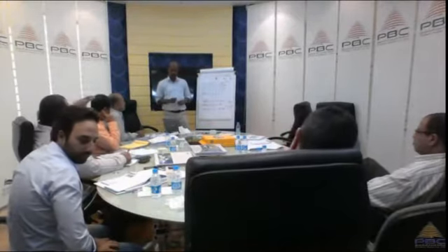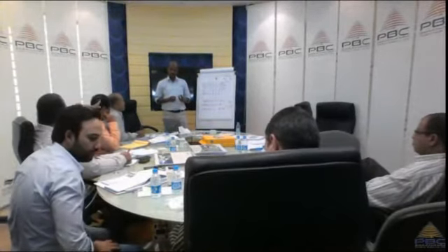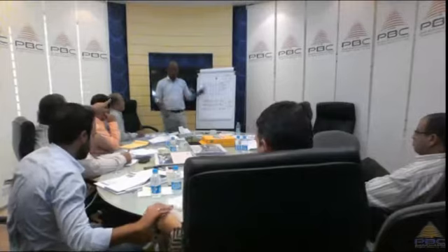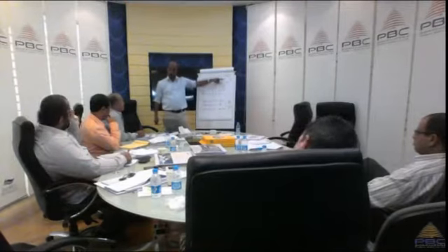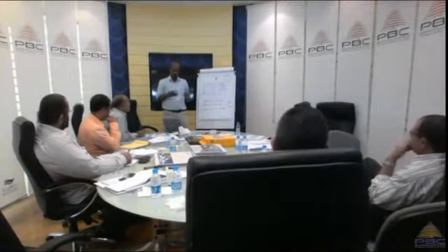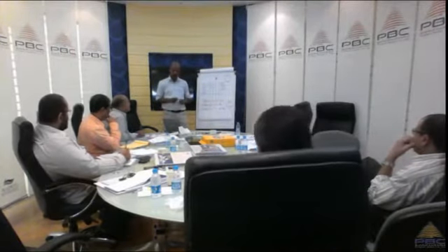If we change your cost of a day, we have to work out the mathematics. So if we say our day is worth $1,000, for example, this will be 1,000, again equals 1 day. So you have to find your scale. That's why I use $1 equals 1 day to explain the concept, but usually it's more complicated than that. Okay, I'll run through it again.